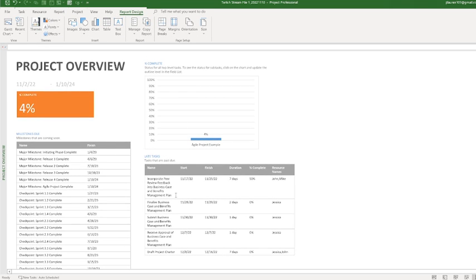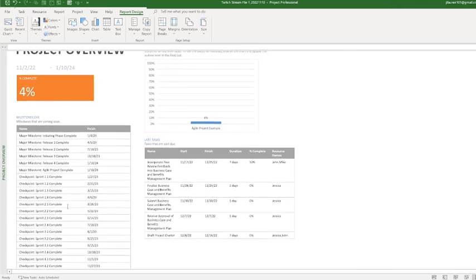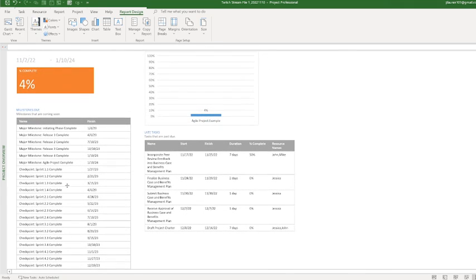So now, as you see, when we set the status to the later time, so instead of it being the 18th, we now pushed it to December 9th. These are our late tasks. So now we see what's late, quote unquote. That means they're past due, so we need to status them. And what our upcoming milestones are due. So as you can see, all these are here. And as you see, our start milestone is now no longer on the milestones due because we did it. Again, it's binary. You either did it or you didn't do it.